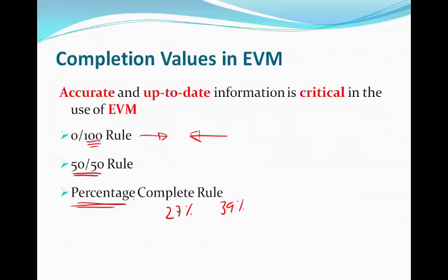If the activity spans several days or months, perhaps a percentage completion rule applies better here, because you have better ability to measure actual completion versus if it's a one-day activity. It's kind of tough to measure exactly if you're 30%, 39% or 51% complete. It's just an arbitrary value at that point. So it's much easier to just use a 0 100 rule.